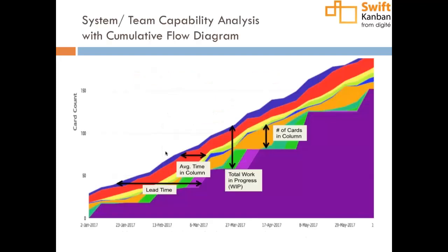And in addition, a few metrics, like I mentioned, start getting used. So the cumulative flow diagram is actually a big initial metric that most teams track, which is probably the best indicator of how the work is getting completed and how work is moving across different stages of your Kanban workflow. And as it says on the screen here, it gives you an idea of some of the key data that you want to track as part of your Kanban implementation.